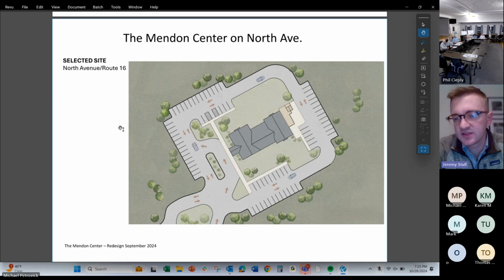Yeah, so the way this debt is structured, I've talked about this at other information sessions before as well as in the building committee meeting. If it's an $11.9 million project and it starts in December, there's not $11.9 million out the door that month, nor by June 30th. So we would structure the borrowing so as to minimize our interest costs and our borrowing costs. We borrow a small amount short term in fiscal 25 to cover initial costs, and then another small amount short term in fiscal 26 to cover what was out the door by June 30th.